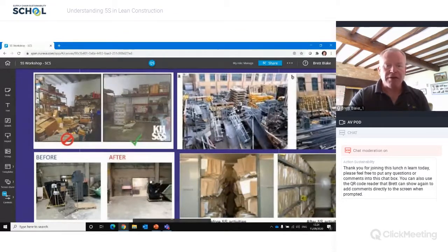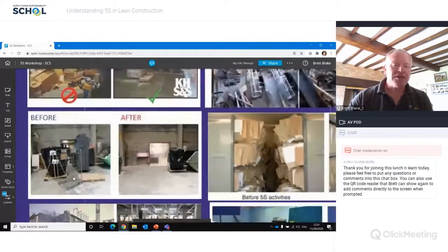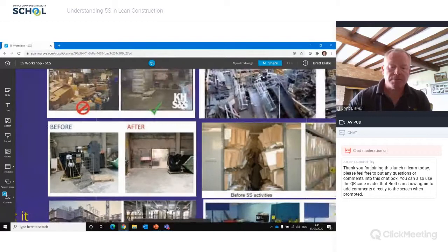Think about how things are racked, how they're labelled. Do we have lists that actually identify where things are kept so people can go to the point of use straight away? Think about the actual work site itself. For everything that has a place that isn't correct, it's actually stopping work in that area. It's stopping maybe the flow of equipment or people. So think about, as we move through our different phases of construction, how do we keep those areas free from debris, free from materials that aren't of use, so that we can continue to do the work that is important?